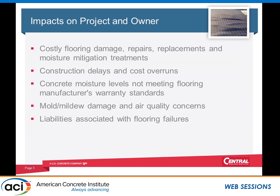From the general contractor's perspective, the good ones actually put a contingency in their bid in case the moisture doesn't come down to the required levels. A lot of other contractors don't put that in their bid and get a surprise about a week before the flooring goes down — now all of a sudden they have to spend anywhere from $0.50 to $10 a square foot on remediation. That's a huge impact to their project, and they either have to absorb that cost or issue a change order to the owner, who is generally not happy.